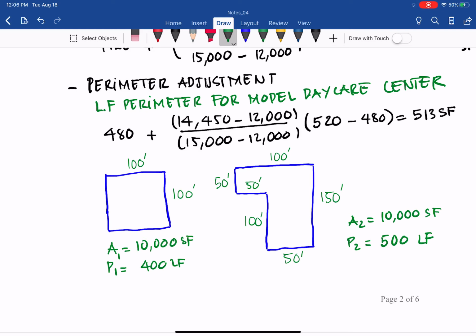Just think about the homes hall for the fourth floor, glazing throughout, but then go to the third and the second floor, the facade should have smaller windows. That is what we call value engineering, to reduce the cost. Otherwise, everyone prefers a bigger window, a wide view to see what's going on outside. Because we try to cut the costs, sometimes that compromises, and as you can see, perimeter plays a key role in terms of the cost of the buildings.